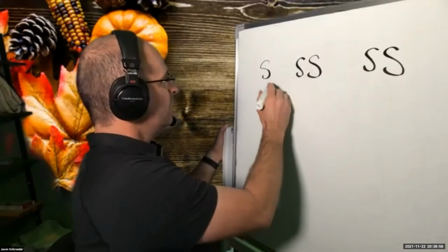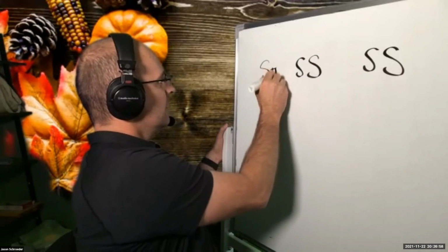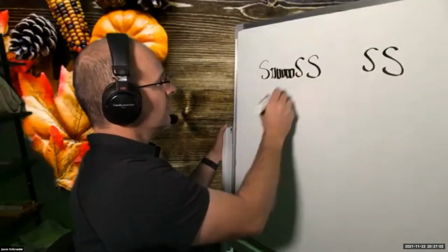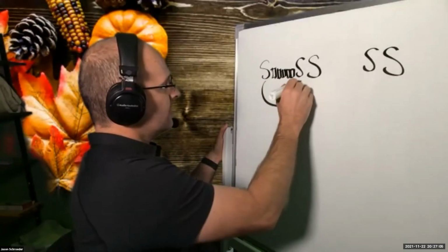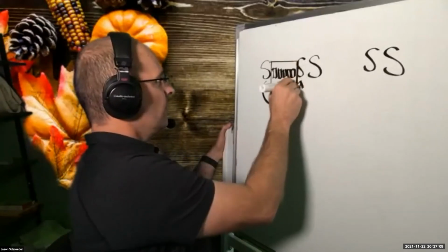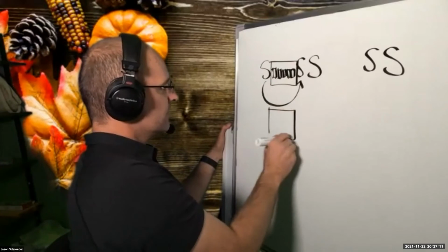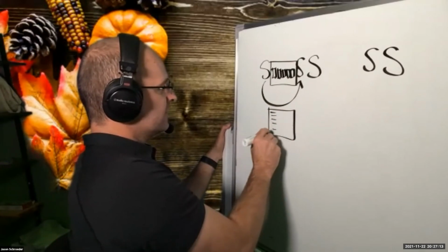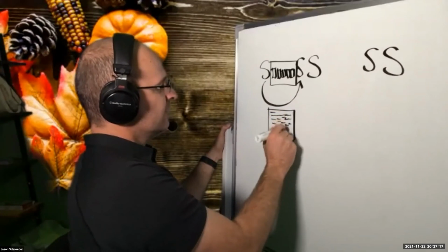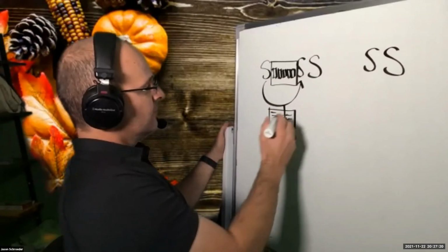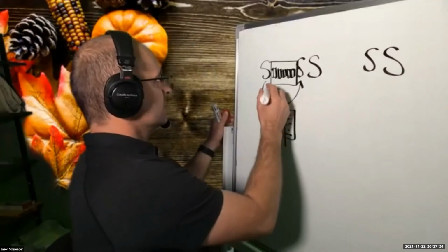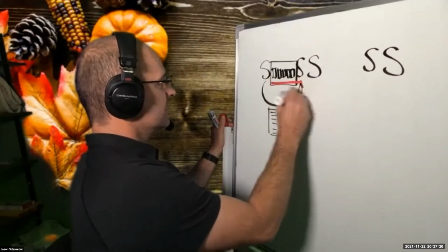But if you attempt to fit a Takt plan into a 5-day Takt cycle, where Sunday and Saturday are your buffers, and you attempt to keep it within the weekends, if you over program this with work, meaning your Mondays fold up, your Tuesdays, Wednesdays, Thursdays fold up, Friday, and you hit a delay, then what starts to happen is you'll get off rhythm, because the first week you have a delay, you'll eat into Saturday.